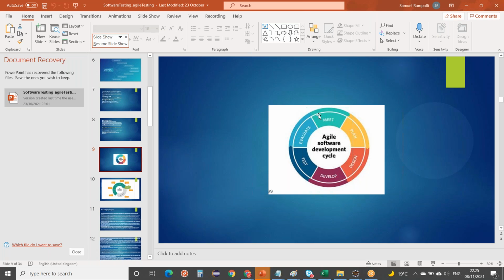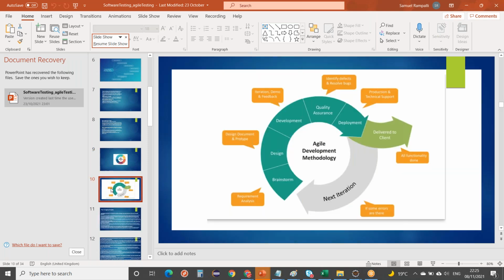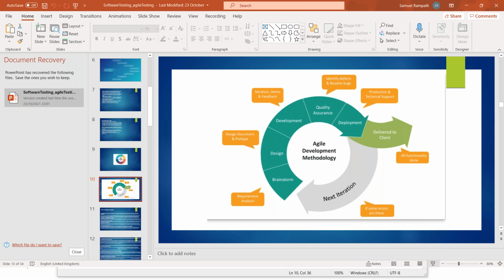How is that? So in a month you have to understand the requirements, plan the testing activities. Developers will design and develop, testers will develop the test cases, then perform the testing, evaluate the results, report the defects, then retest and then give it to the client. So in each iteration you have to perform all those activities that you used to do in the waterfall over the year. Okay, so all year long we used to do it.